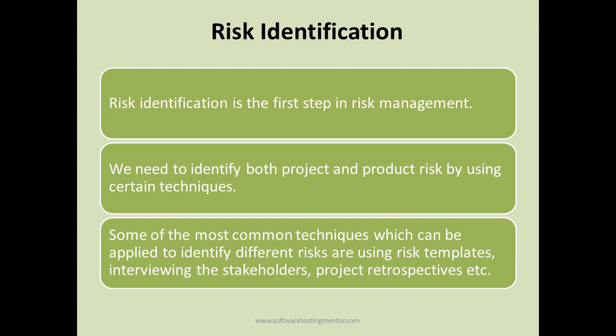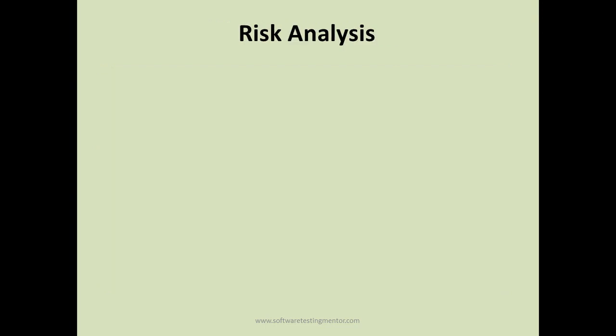in the project. So in the risk identification, you should have a template first with all the major functional, non-functional risk factors that you want to discuss, and then with interviewing, with one-on-one sessions, you can figure out different risks and identify different risks in the project or product.